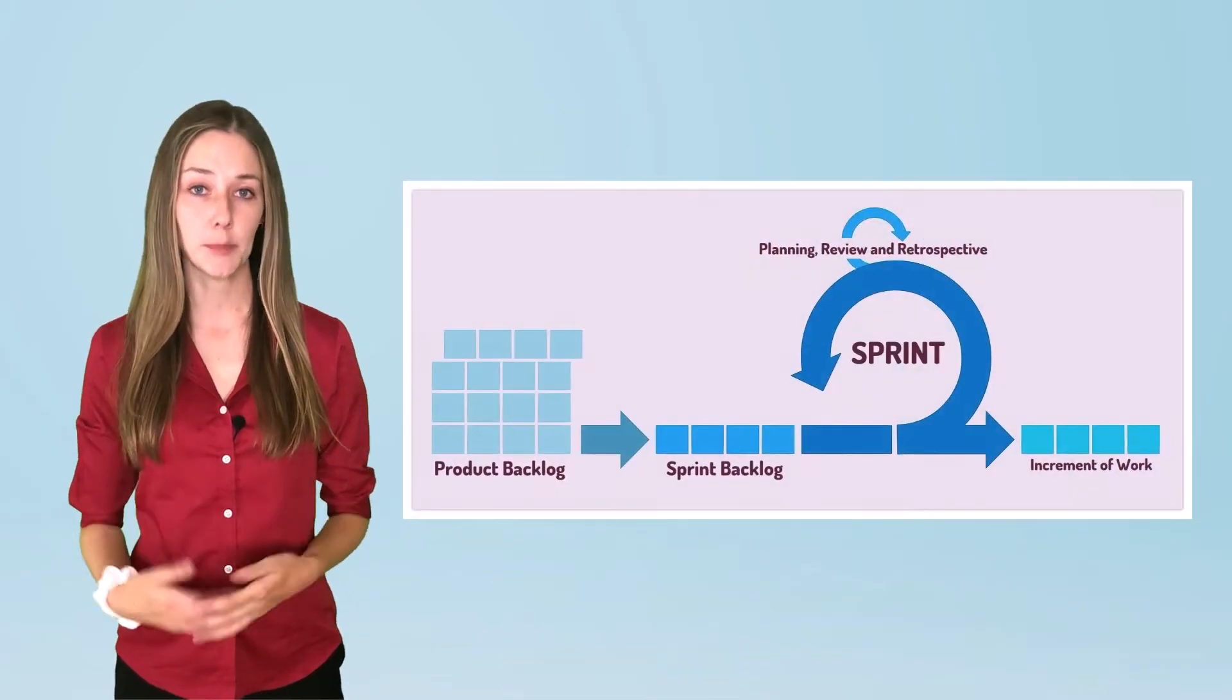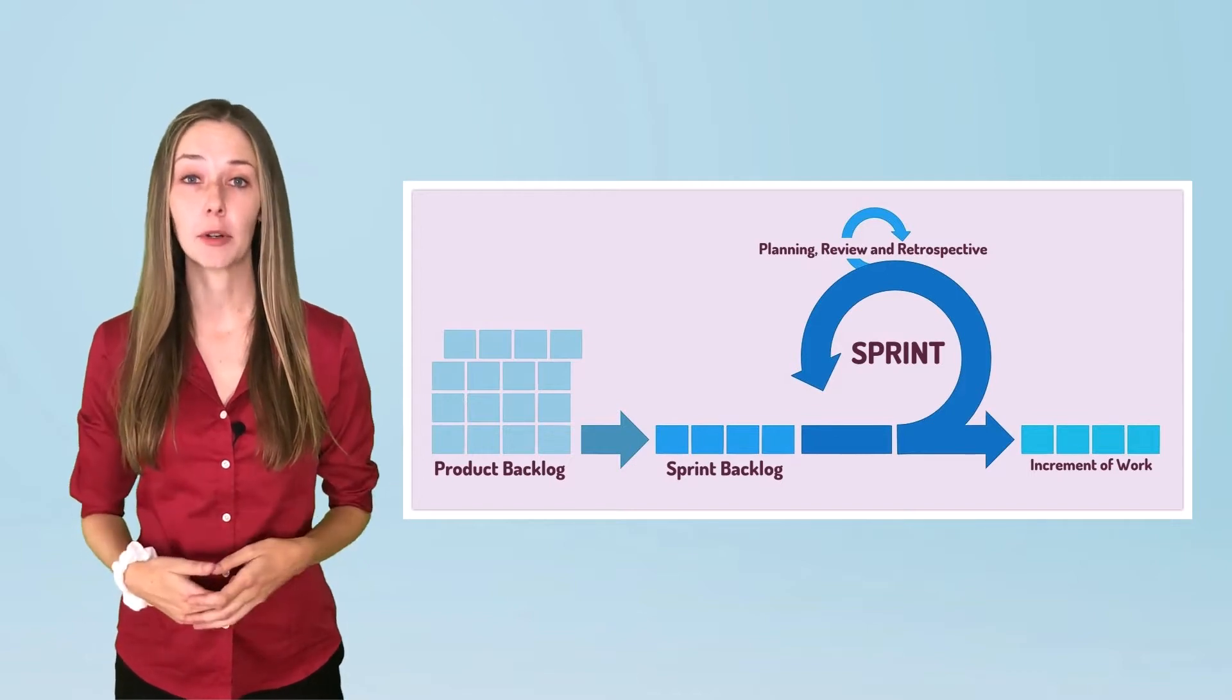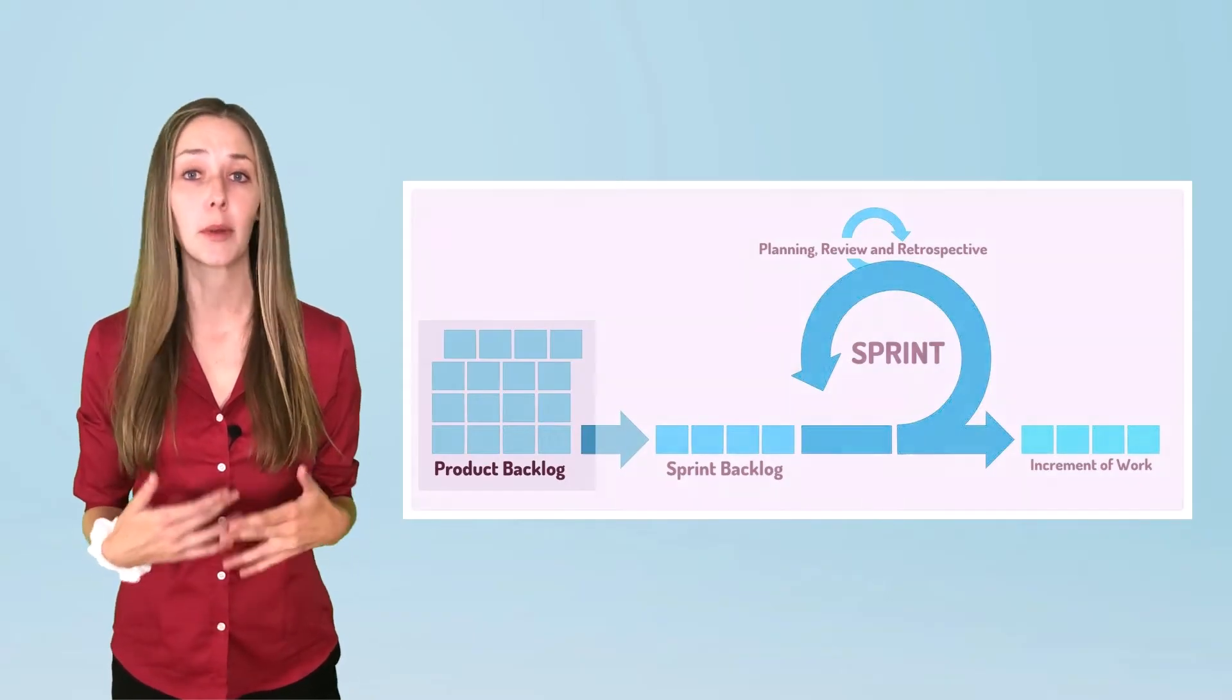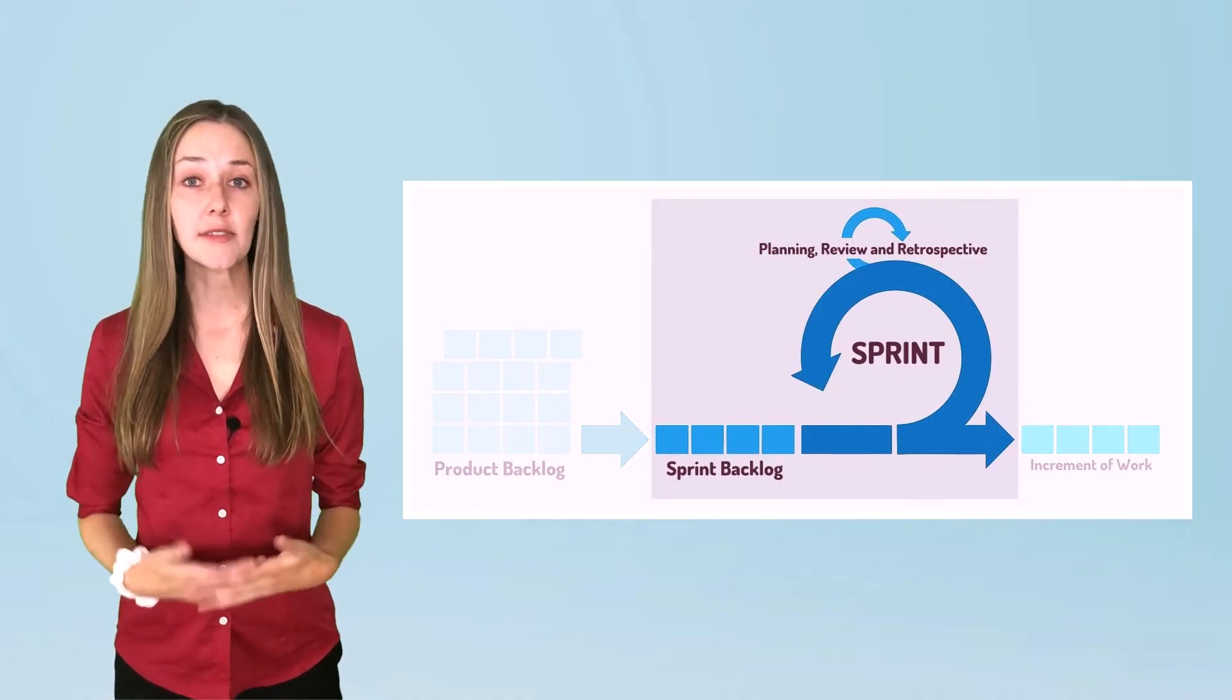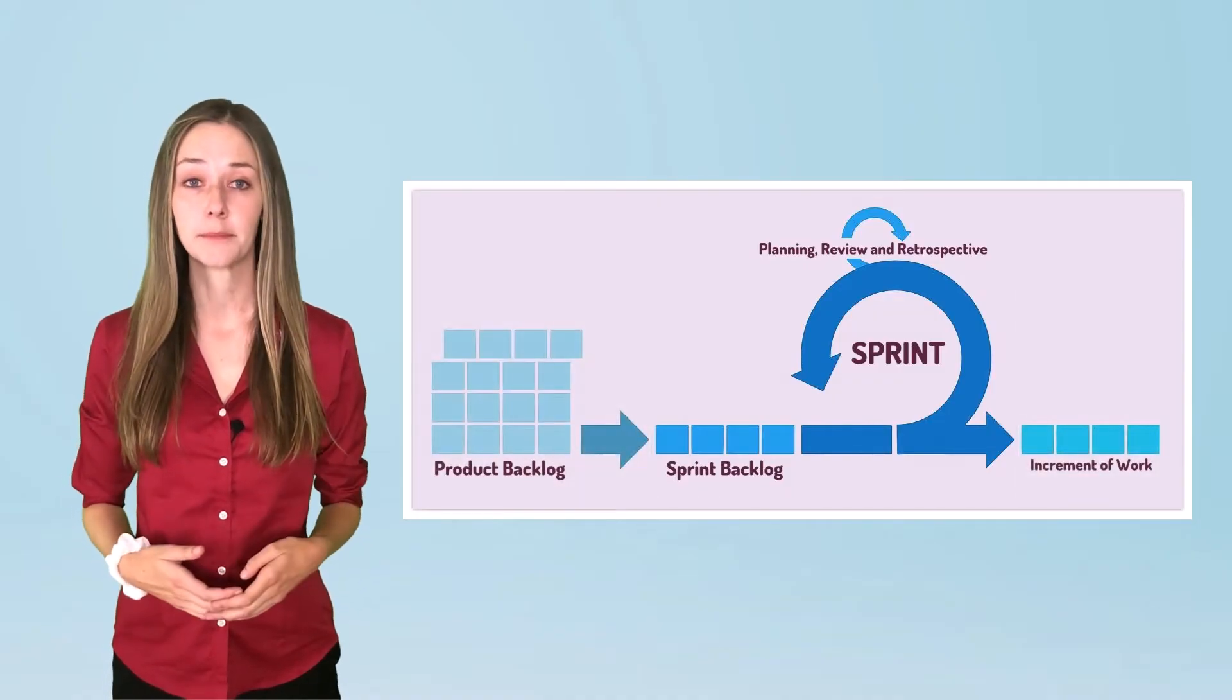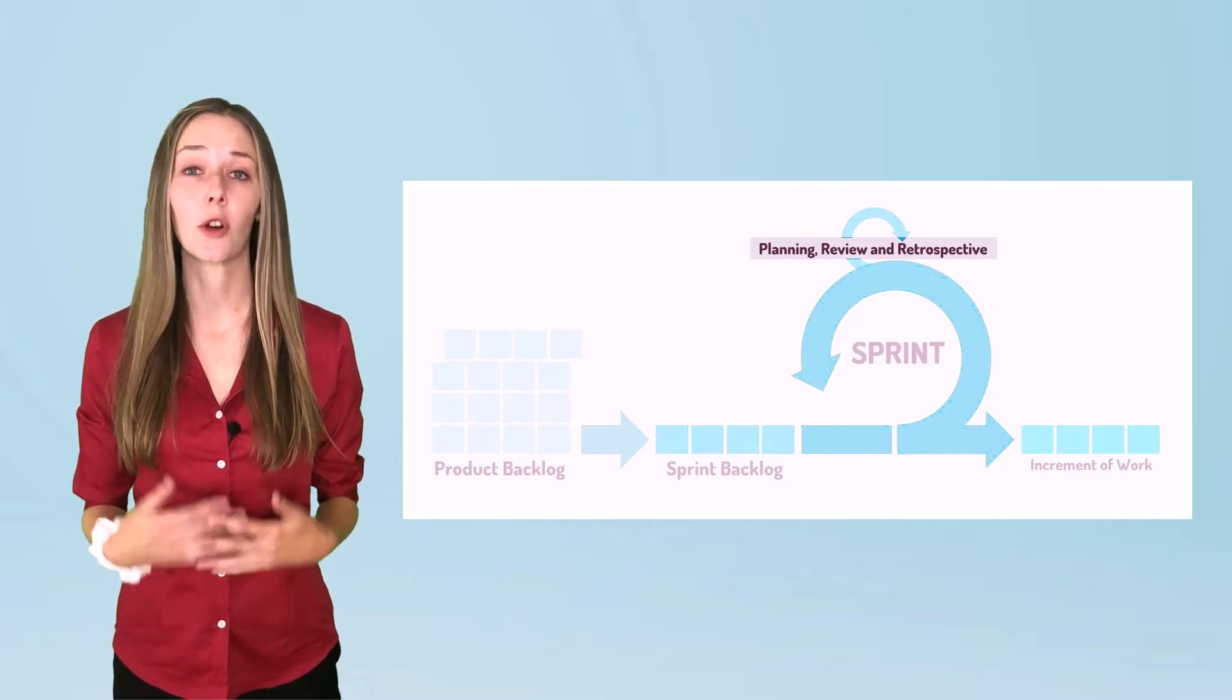In Scrum, you plan sprints. The Product Owner, Scrum Master, and agile developers look at the backlog of features to be developed and figure out how many features can be completed in a two or three-week sprint. Then the sprint begins. Features get developed, and once the two or three-week sprint is done, the progress is reviewed and a retrospective is performed. Planning, sprints, reviews, and retrospectives are all key elements of the Scrum framework.